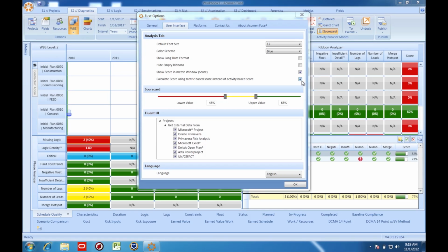The breach of any single metric on a task will prevent those tasks from receiving a passing grade. Metric-based scoring allows incremental improvements to tasks to be reflected in the overall score. The metric-based method typically produces higher scores, as a single task would need to fail in multiple areas simultaneously in order to receive a very low score.